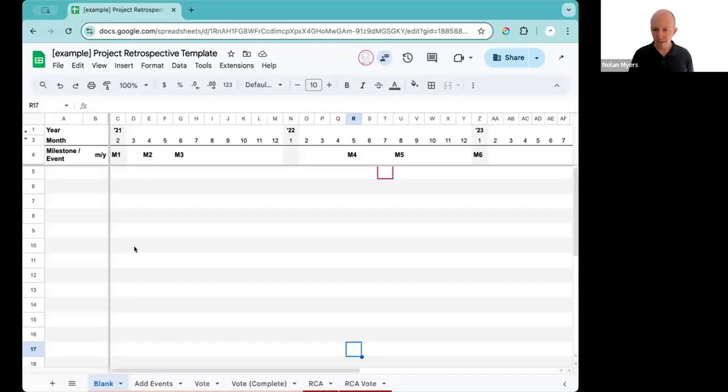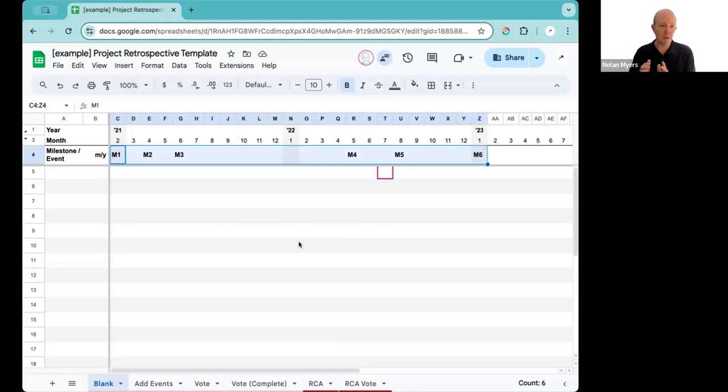Yeah. So let's look at that together. What typically would happen here is the milestones. The way I've used this is to focus on key steps along the way that might have management approval, for instance. So this might be when you got the very initial go-ahead with a project charter. M2 here might be the beginning of the design phase where you say, okay, we're going to actually build it out into a design. M3 is a design phase. This might be design or manufacturing or things like that.